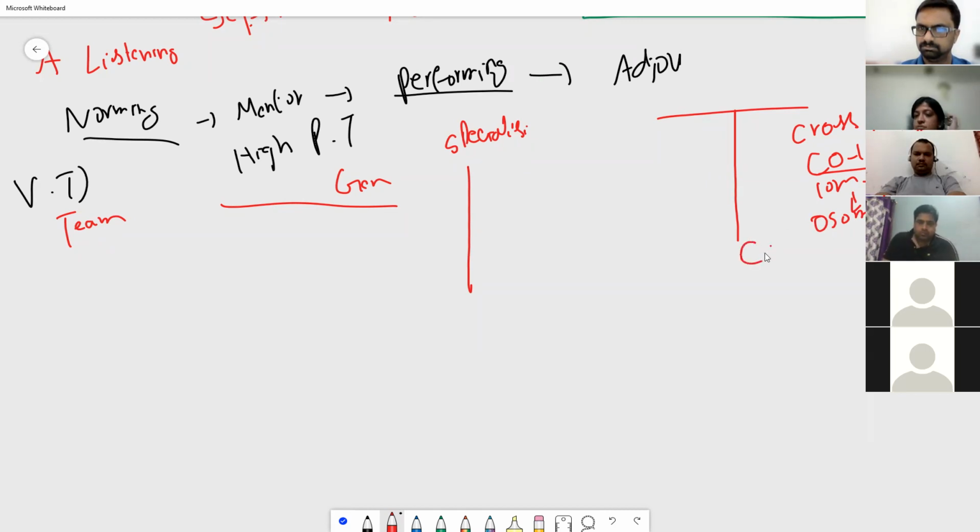We try to have caves and common area. Caves are semi-cubical areas in which people can go and do their special, private work. In the common area, everyone is sitting together and working. We have information radiators in the projects. Information radiators radiate the information: the task board, the Kanban board, the burn up chart, the burn down chart. All those things are information radiators.